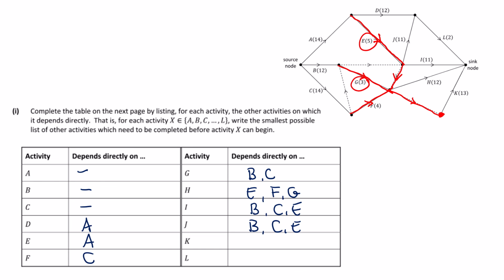So we're going to have E, G, and F. So we'll put them in order, E, F, G, when it goes in. For the same reason, we're ignoring this because that dummy just takes B and C, which remember have already been included in G. So because we get back to this node where G has already started, we know that everything has already been considered feeding into G.